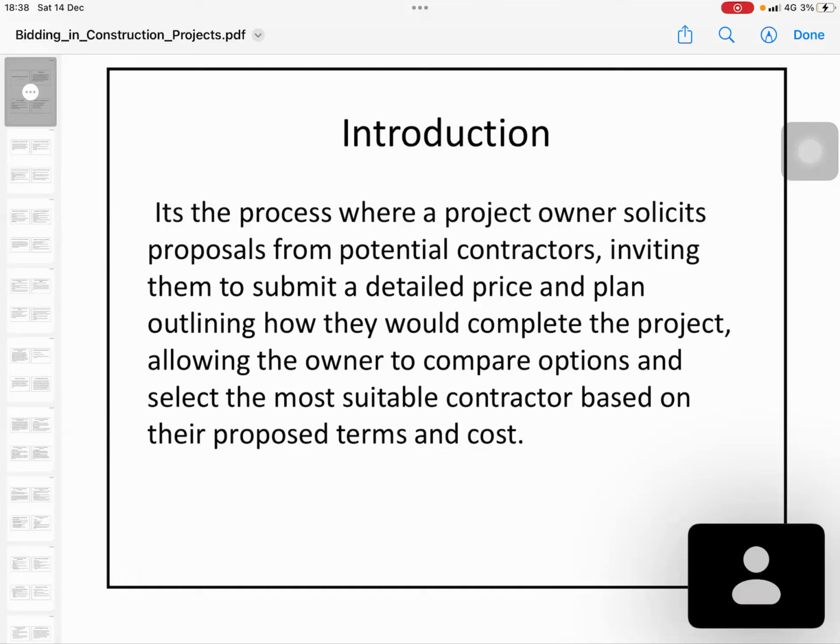Then the offer goes to the client or developer, who will make the acceptance. Different contractors give different offers. Basically the conditions and terms are all the same, but the proposal cost of the project is different, and the accepted one is not only the lowest, but is chosen considering the nature of the project and the experience of the contractors.